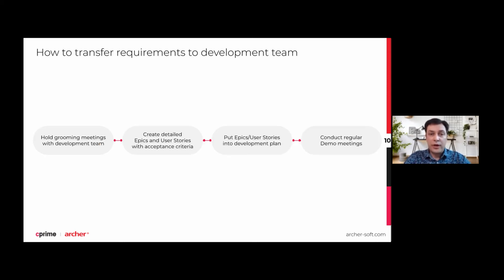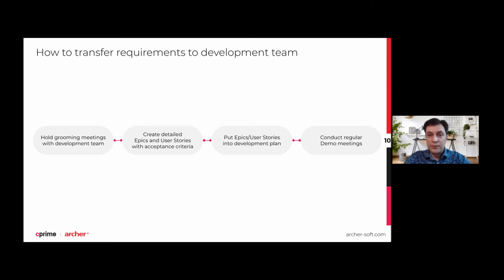After SRS document creation, we need to transfer it to the development team for estimation and further development. First, we may set up grooming meetings with the development team. Depending on the team setup, it could be not the whole team — if the team is big — but just the technical team leads, for instance, dev lead, QA lead, etc. The next step is to split all requirements into epics or user stories with detailed descriptions and acceptance criteria, which will be verified first of all by QAs to make sure development is done correctly.